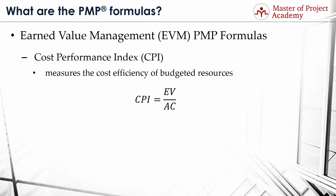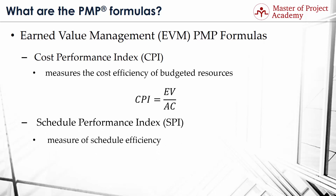PMP formula number 6: Schedule Performance Index or SPI. The Schedule Performance Index is a measure of schedule efficiency. It represents the ratio of earned value to planned value, and is one of the most common PMP formulas for control schedule. Its aim is to measure how efficiently the project team is accomplishing the work. Accordingly, its formula is: SPI equals EV divided by PV.